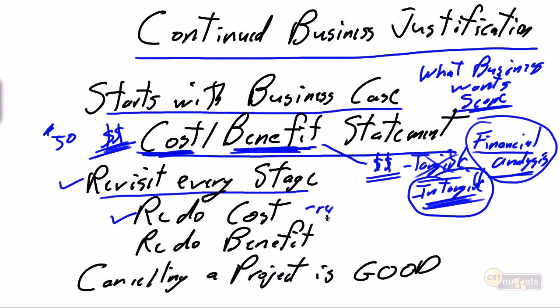we replan. Based on the new information I have at the end of analysis, I now know design is going to be $25,000 as opposed to my last time estimate at $23,000. Why? Because I have better data. Now that analysis has been done, I have a far more comprehensive understanding of the work that's required for design. So I absolutely have better data, I can do a better plan, and I can have improved accuracy.